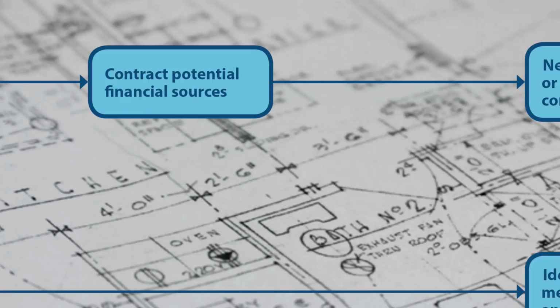We update total development cost based on site-specific information and investigations. For example, environmental testing results allow the developer to make more accurate projections of remediation and cleanup costs. Specific design decisions that reflect zoning and other local requirements inform more precise construction cost estimates.